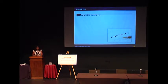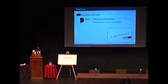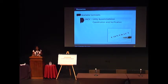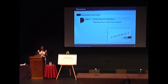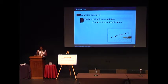Moving on to some available resources: one is the Utility Accommodation, Coordination, and Verification contracts — we call these the UACV contracts. These contracts act to provide an extension to district utility coordination personnel. It's a non-professional services contract, so you can't hire a vendor to do the SUE or the design. However, we can hire consultants to perform the coordination activities to serve as the liaison between the TxDOT districts, the right-of-way division, and the utility companies to move these projects forward.